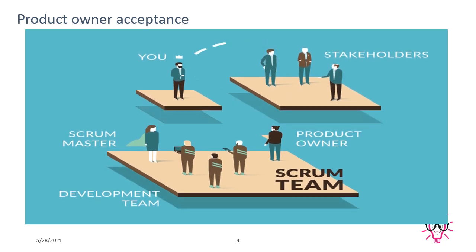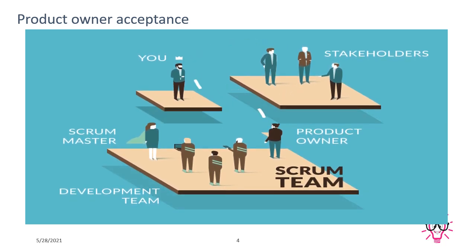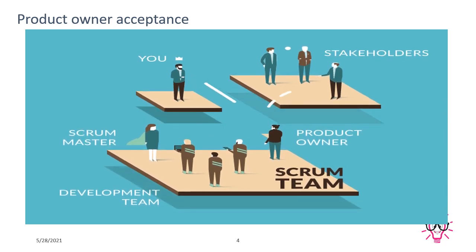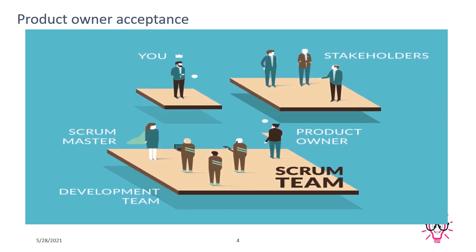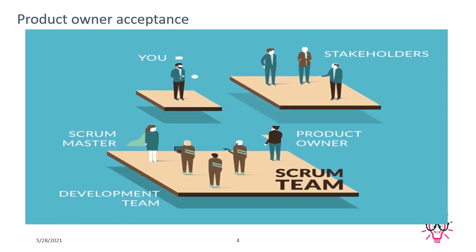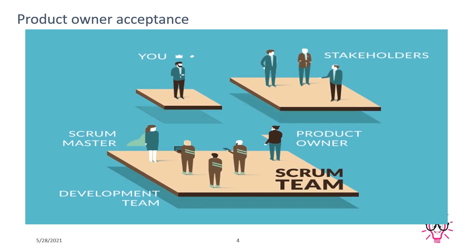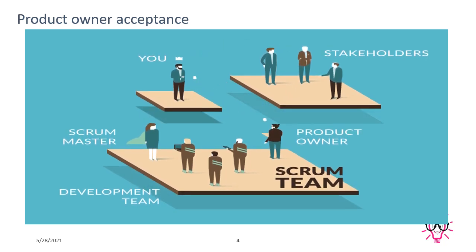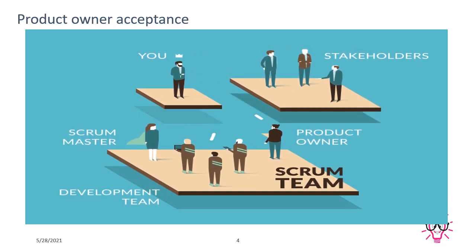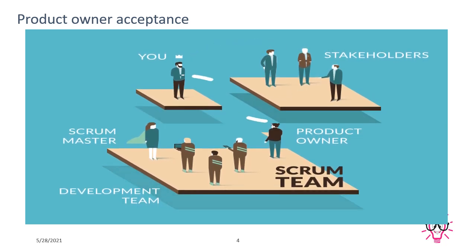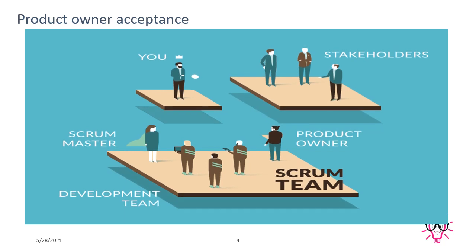So this is the second test, where team members go through each and every requirement on higher or urgent priority, and read all the descriptions and acceptance criteria. If they think there should be a modification in the acceptance criteria, or a few things are missing in the description, because these are technical guys, they can catch it very quickly.